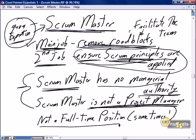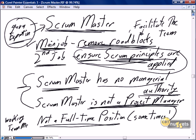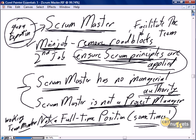Scrum Mastering may not be a full-time position — the Scrum Master may also be a working team member. If your organization is new in the implementation of Scrum principles, then being a Scrum Master is absolutely a full-time position. There's going to be a lot of roadblocks, a lot of coaching, a lot of supporting, encouragement, and enforcing of Scrum principles in a new implementation.